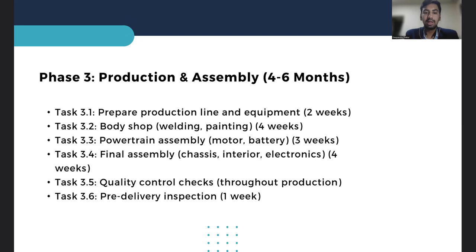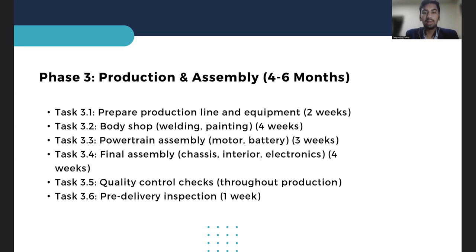The third phase is production and assembly — the core operation, lasting four to six months. Here the production line is prepared, the body is formed and painted, the electric motor and vehicle are assembled, and everything comes together in the final assembly stage. Quality control checks happen throughout this phase, with a final delivery inspection before the vehicle moves to testing.